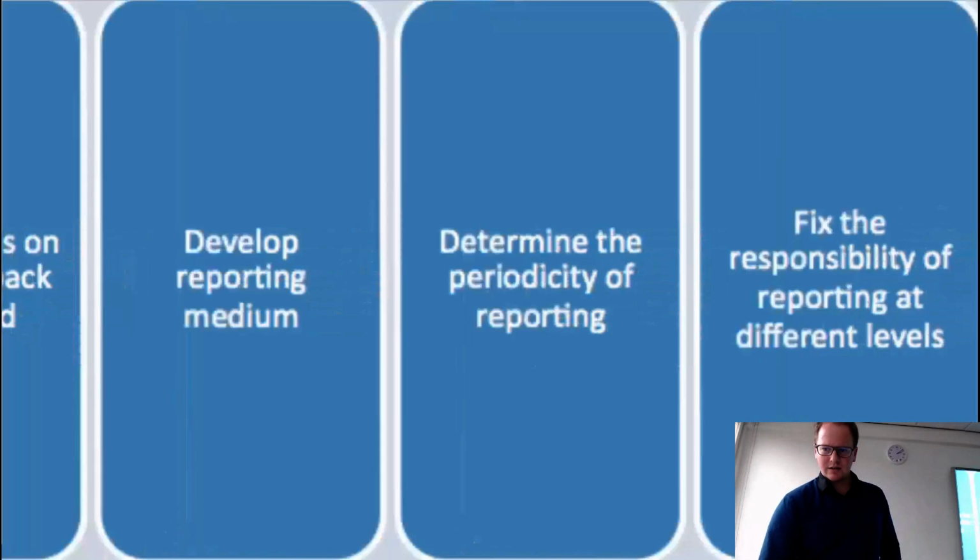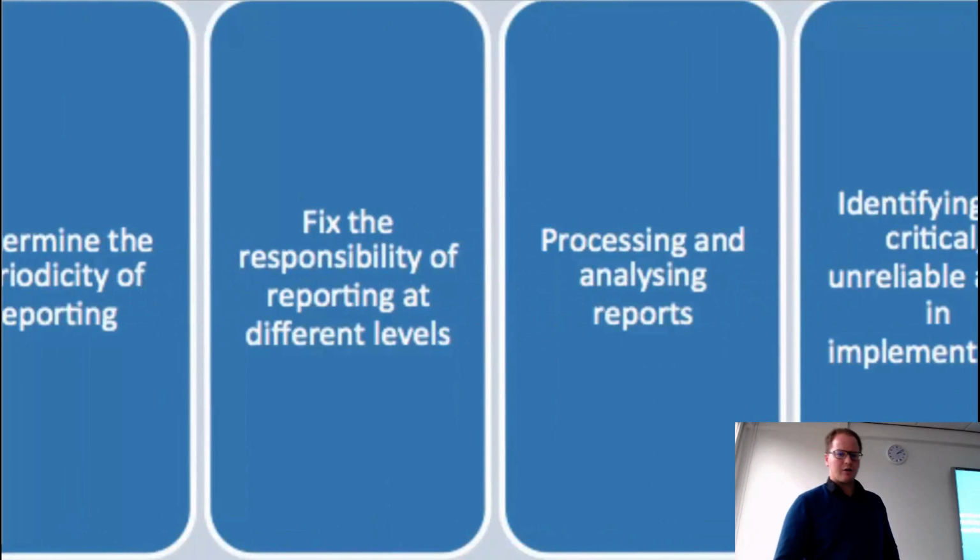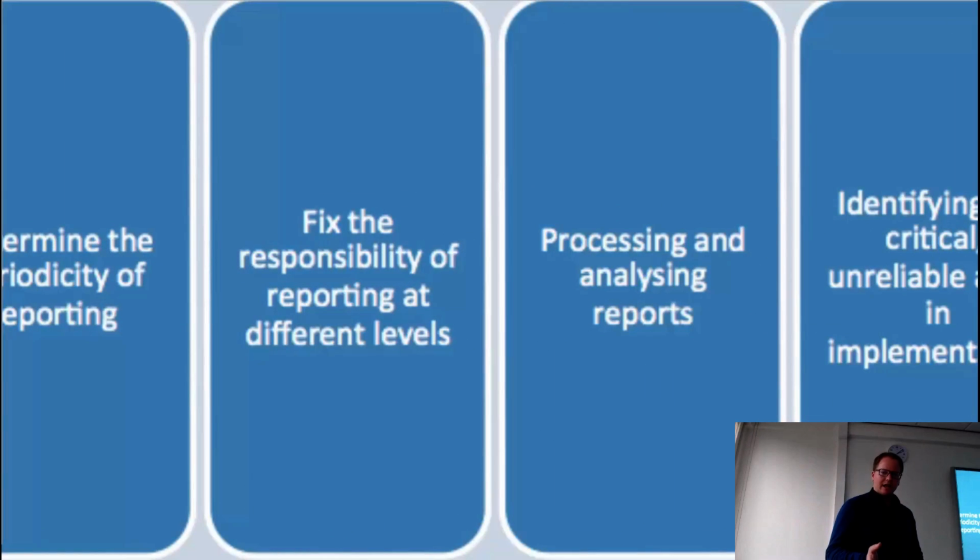Then fix the responsibility of the reporting at different levels. And you want to have the responsibility sitting with capable partners. So this can even be like a community service with environmental pollution, if you have a station that is actually keeping the data. Or actually a good example of social sustainability is